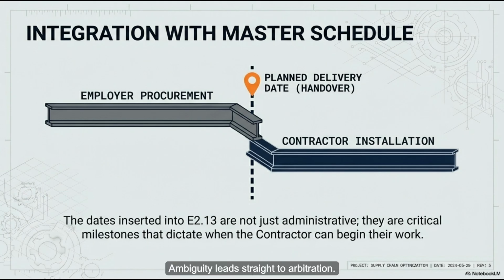Exactly. Ambiguity leads straight to arbitration. By forcing the contract writer to literally type the word NONE in all caps, you are completely removing all doubt. You are making a definitive affirmative statement. I am giving you absolutely nothing. It forces the employer to double-check their own generosity. They have to actively sit down and decide to give nothing. And it protects the contractor, too. If the document says none, you have to budget for every single drop of water and foot of wire.